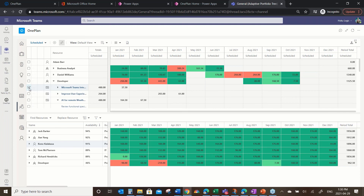We also have the ability to create negotiations — where a PM can request a resource. You may have noticed in the resource plan that some items were planned or proposed versus committed. So a PM proposes a resource — I'd like Tom to be on my project — and the resource manager can review that here and accept, or reject and change that request and say, sorry, Tom's allocated to something else, but you can have Jack instead. Every organization has a different cadence for how they want to go about that — whether the PM can book their own resources or whether they need to make a request — and a resource manager uses these views to fulfill on that and tell the project team who's on the project, then keep managing it and telling us how it's progressing so we can make decisions about future work.